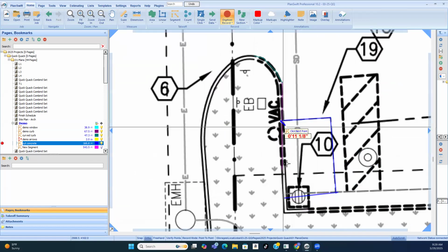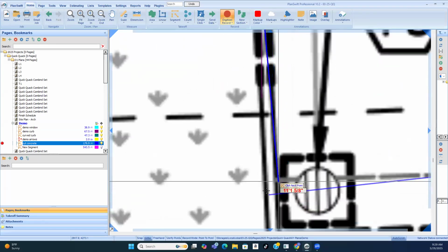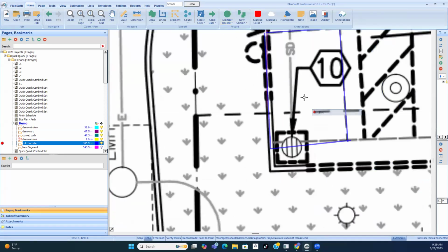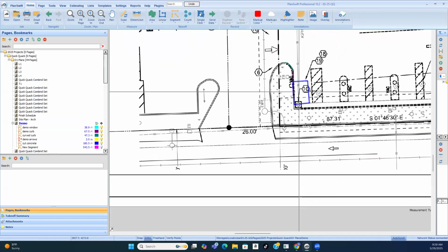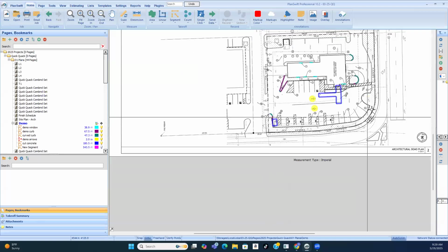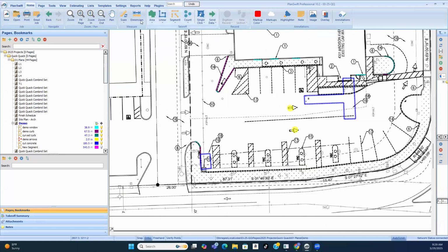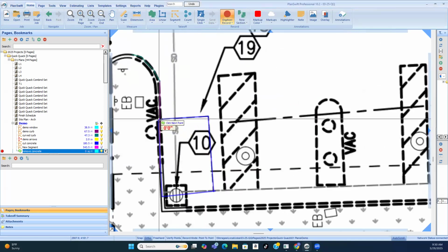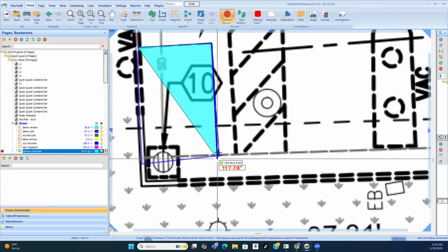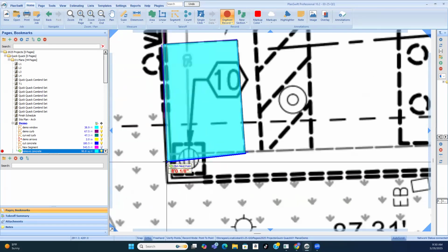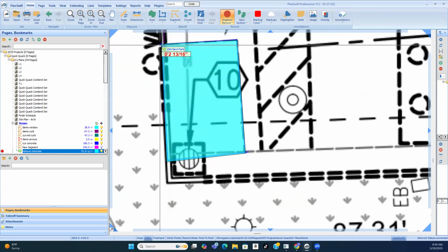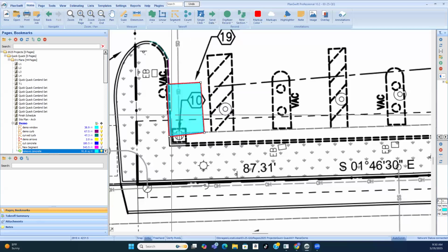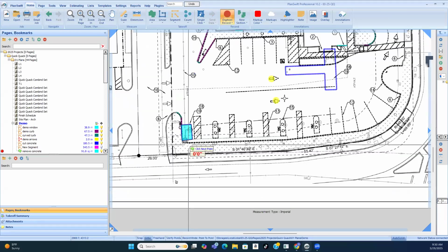Because I see, well, this is where they're putting in the safe box or something for the, what is it, their little electronic thing. Okay, so when we demo concrete, that's the first step, and then we have to do the area, remove concrete. Okay. So that always has two steps. Oops, shouldn't have stopped. And then this one here.